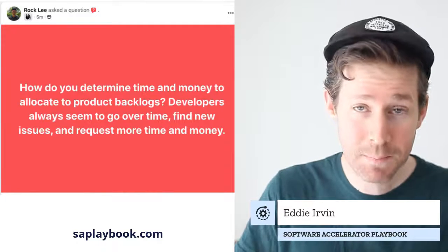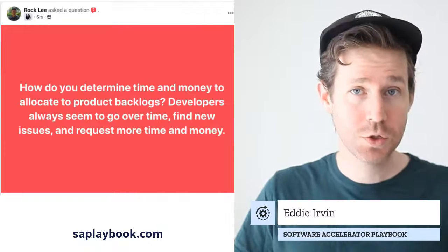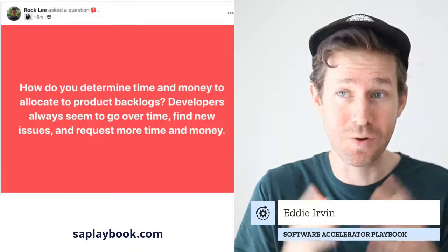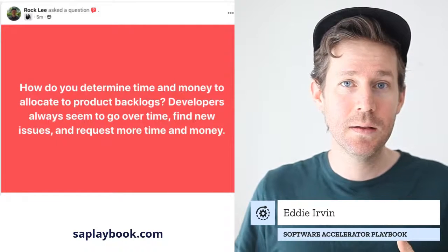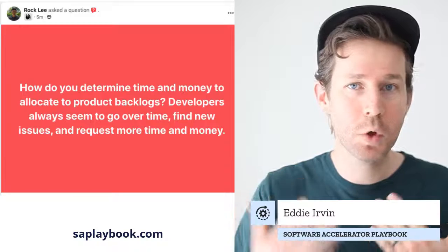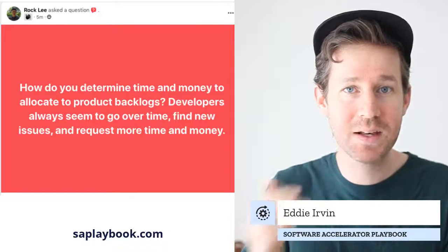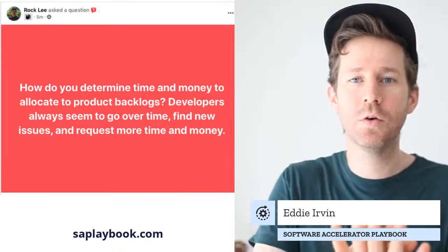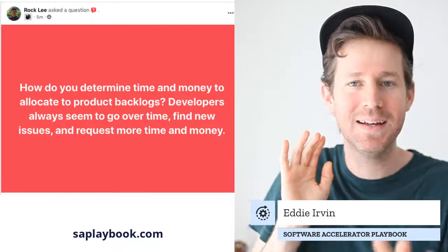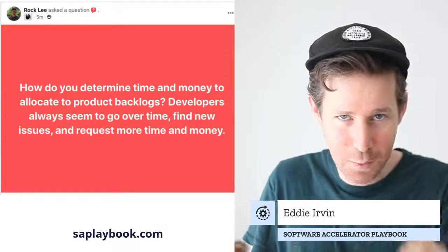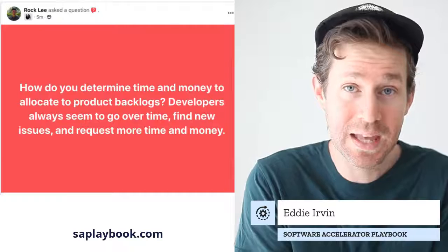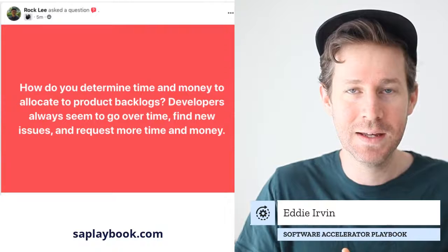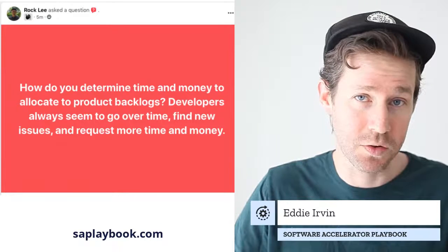Specifically, if you're not paying them to do scoping, if you're not paying them to make the product checklist for what needs to be done, then they can't spend multiple hours just sitting there and thinking through every little thing, because they're not inside it, working on it, tinkering with it. They're one layer separated from it, not understanding every single piece that's already there. So once they finally start going in, they go into the software, they peel back the layers, and then they go, oh my gosh, this other stuff is going on. Then they're going to discover some other things that are happening.